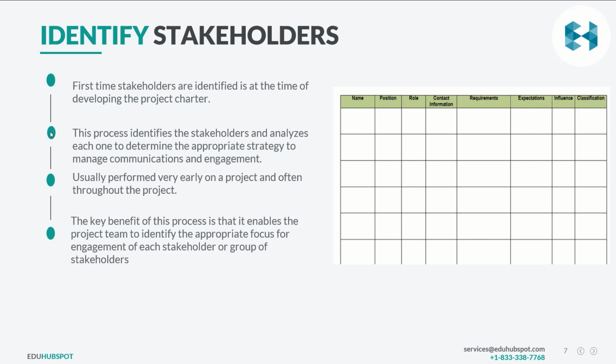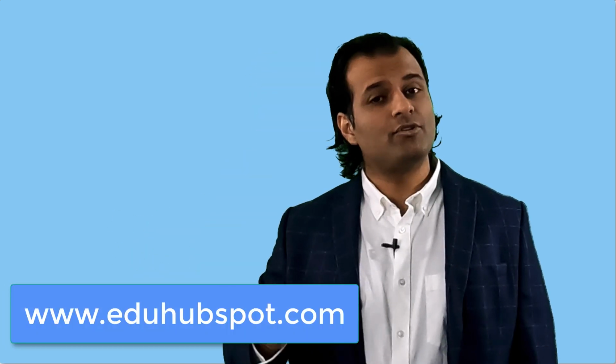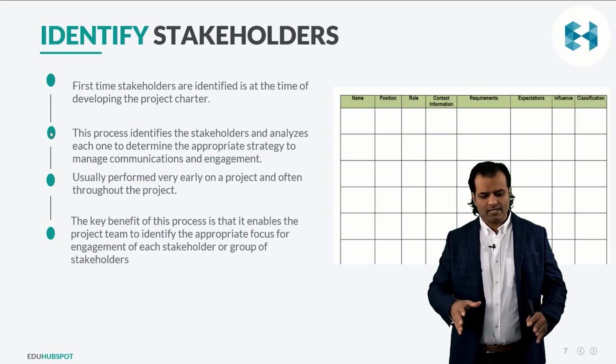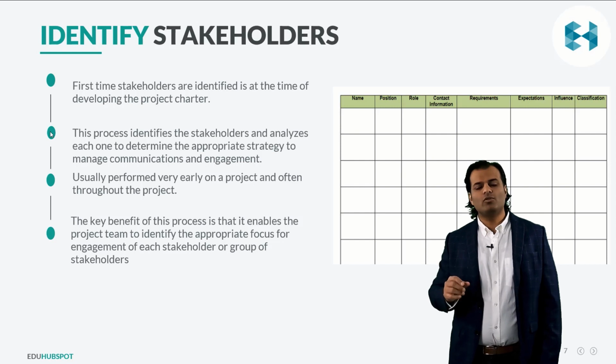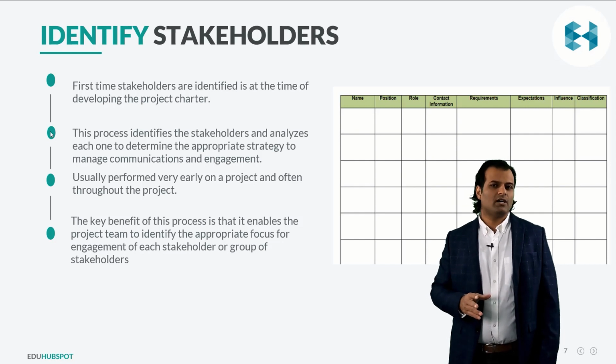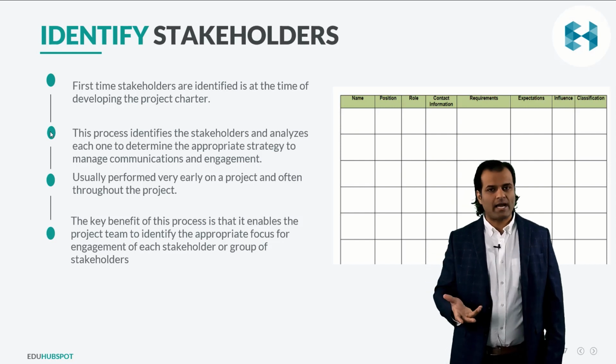Once you know what stakeholders are, the first thing you really want to do is make the stakeholder register. I'm going to talk about the stakeholder register in detail when we create it in further modules, which are available on my website. But for now, make sure that you identify each of the stakeholders who are responsible or will have an impact on the project.